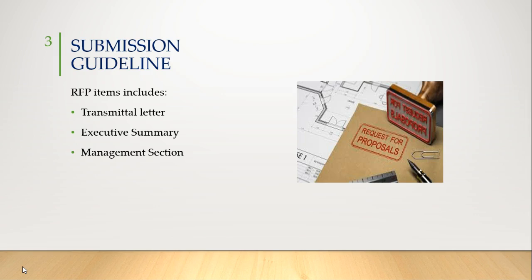Executive summary. The executive summary shall be a concise description of why your services are most appropriate for the customer. This part of the request for proposal shall be written in English. The executive summary shall not be longer than 3 pages. Nonetheless, the main purpose is to convey the message.